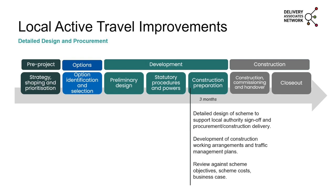You might want to then think about whether you do a two-stage assessment, or how the funding is split. So do you split the project into a couple of different portions, which might sit across different delivery bodies? For example, the local authority might want to deliver all the street lighting and the signals equipment, and you might then want to bring on a traditional contractor to deliver the civils and highways works in those instances.